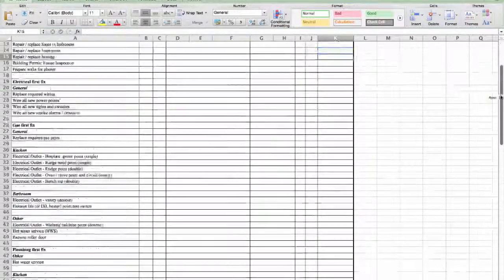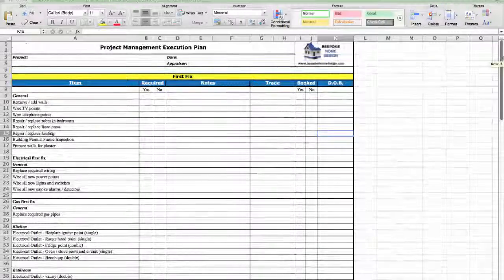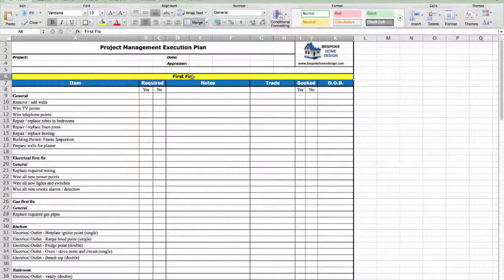The first fix comprises all the construction work that starts with building the foundations and walls all the way through to putting the plaster on the internal walls. This includes constructing the walls, floors and ceilings, and inserting cables for electrical supply and pipes for water supply, right up to and including putting up the plasterboard. Essentially, this is the work that you won't see when the project is finished. It's the body of your house upon which we then put on the clothes.